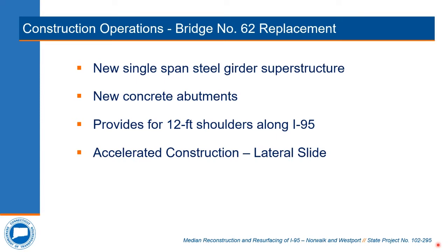As previously noted, in an effort to reduce the overall construction duration and minimize impacts to both the traveling public and local residents and businesses, the bridge replacement will utilize an accelerated construction methodology known as a lateral slide. More on this in a moment.